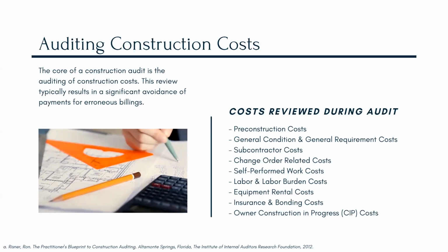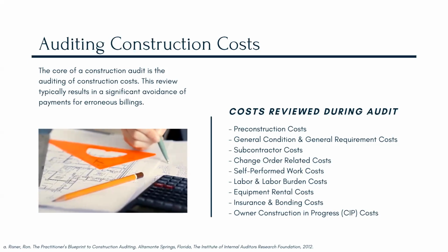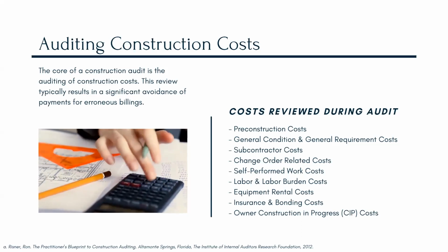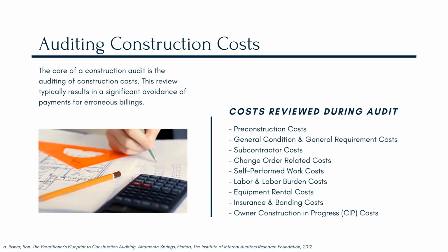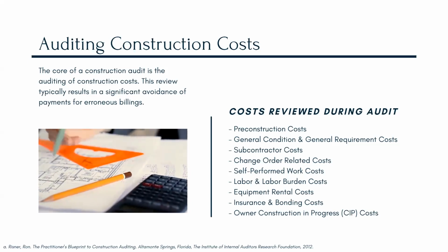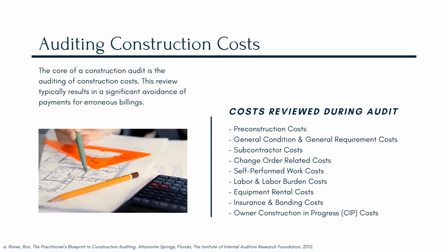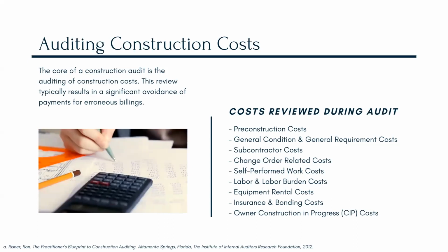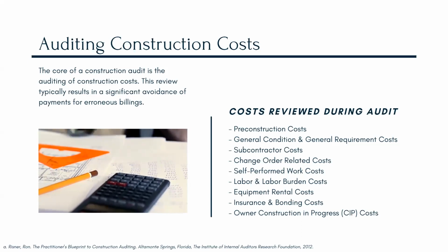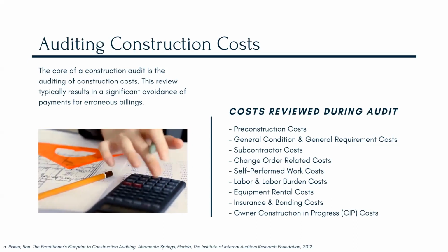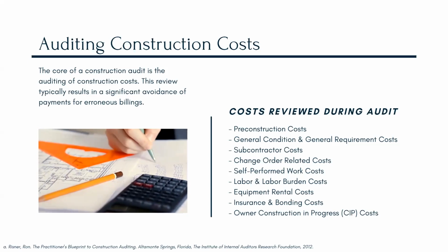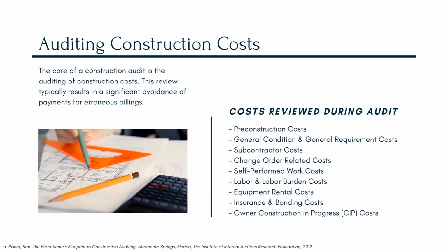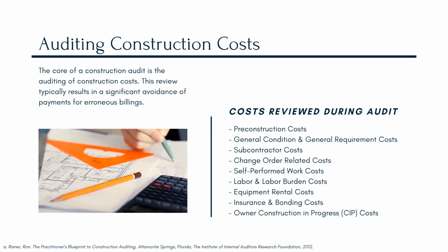The reason being, a lot of times in contracting or bidding on work, general conditions are submitted as just a general placeholder, and the actual costs rarely align with those estimated placeholders. And so a lot of findings coming out of construction projects are related to change orders or general conditions, when the contract supports an actual cost basis for the payment by the owner to the general contractor on general conditions.